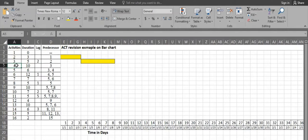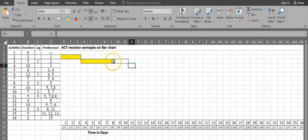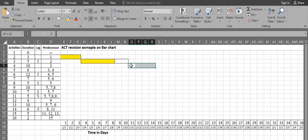Activity 4 has a duration of 10 days and its predecessor is activity 3. There is a 2-day lag on activity 3, so activity 4 will start 2 days after activity 3 is over. We mark the lag, then activity 4 requires 10 days: 1, 2, 3, 4, 5, 6, 7, 8, 9, 10.